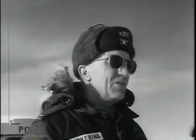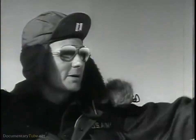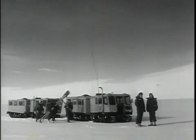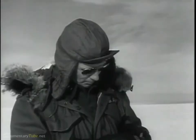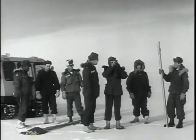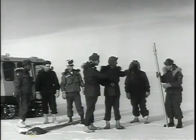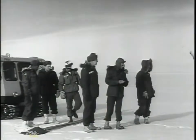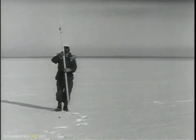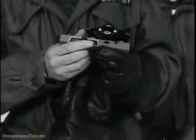Colonel Kirkering, commanding officer of the United States Army Polar Research and Development Center, was with me when we made the final reconnaissance. We needed a flat surface, a level with less than 1 degree of slope. This would minimize construction problems by enabling us to keep all of our tunnels on the same level. We finally picked this plateau, a smooth white plain of ice for as far as you could see.